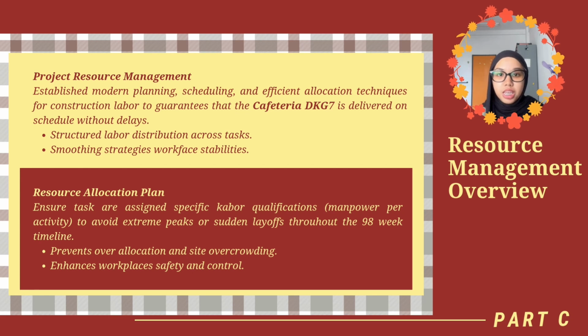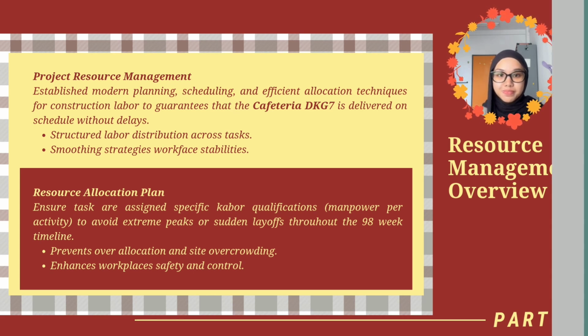Over our 98-week timeline, we ensure that every task is assigned a specific labor qualification. This dynamic management approach is crucial to preventing over-allocation and site overcrowding, which ultimately enhances our workplace safety, keeps costs under control, and avoids sudden disruptive layoffs.